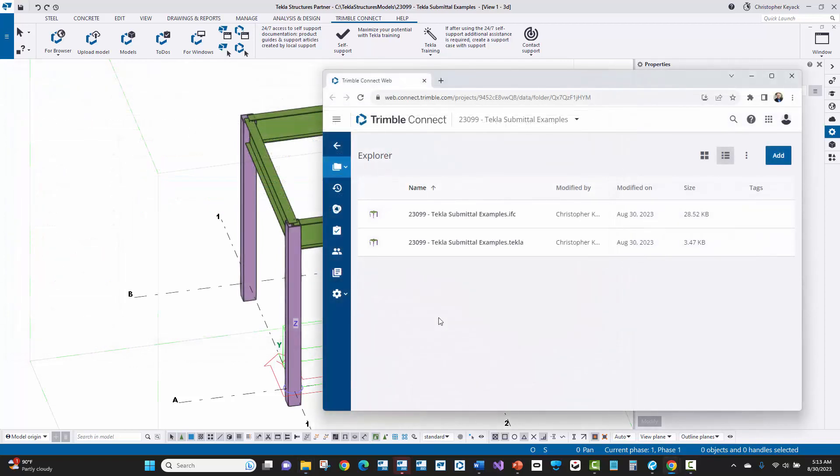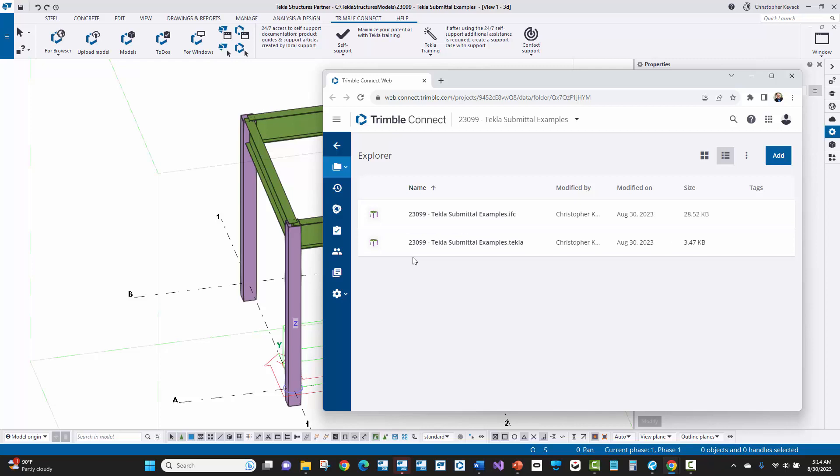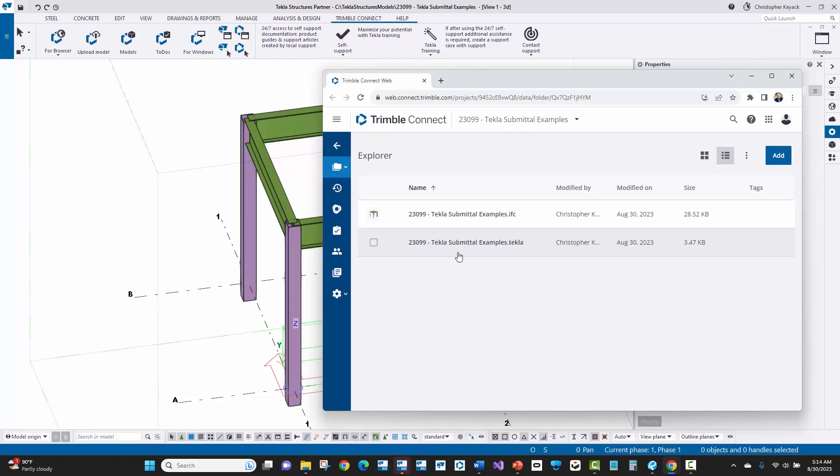Now, a lot of people get confused on what to do when dealing with revisions or the next submittal on the job, and they're exporting a new IFC or .tecla file. Again, you don't need to change the name, so we don't want to have multiple files here. What you'll do is you'll export or just press the upload model button and it will replace the existing file that's there. However, Trimble Connect is going to keep a record of all of the different versions that have been published for that file with that same name. So you don't have to put dates or different versions and have a collection of those here in the Trimble Connect project folder. You just basically will have the same file name published each time you have a new submittal or a new version to upload.